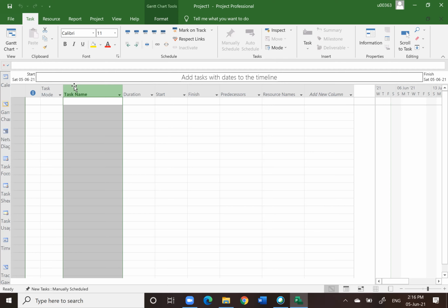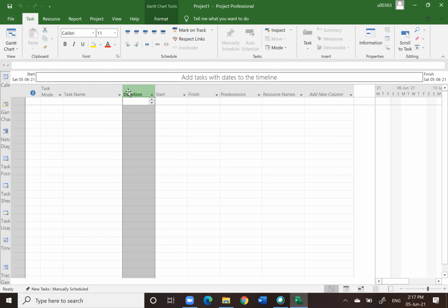Then come the substructure works. Substructure work involves piling, perhaps a basement if you have a basement structure, and then ground beam, stump, everything with regard to substructure works below ground. Then superstructure, etc., etc. So how do you do that? You do that by organizing your project.